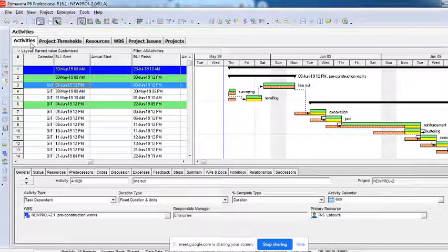Some issues it cannot identify, such as a technical issue, like the example I told you about honeycomb. Your Primavera does not have the capability of looking for honeycombs to understand it's an issue. Accidents, issues related to the procurement processes, communication, issues with human resources, labor. These issues cannot be identified by Primavera; you will have to identify them manually and then add them.